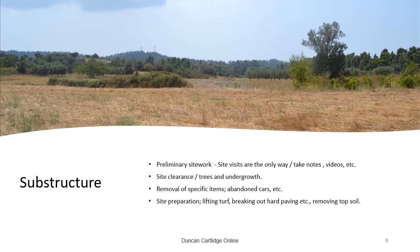Urban sites in particular can be dumping grounds for all sorts of items, large and small. I once remember a site where we discovered a large safe. It was empty, I should add. But it was very heavy and needed considerable effort and cost to remove. All such items have to be logged and included in the Bill of Quantities or work package.